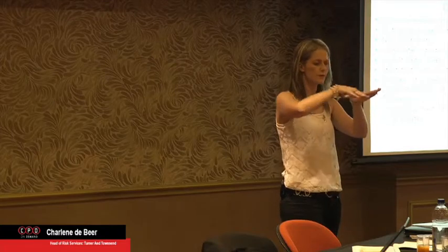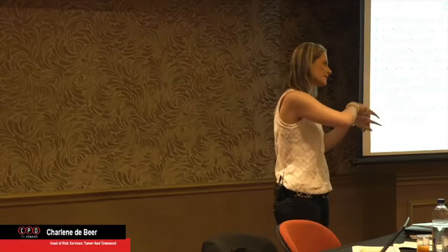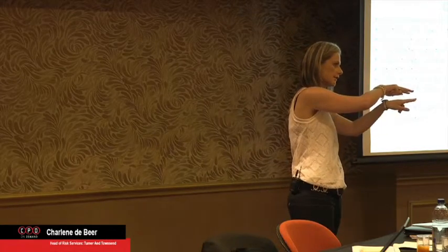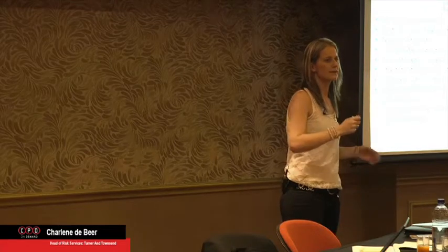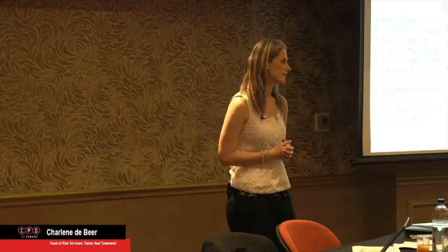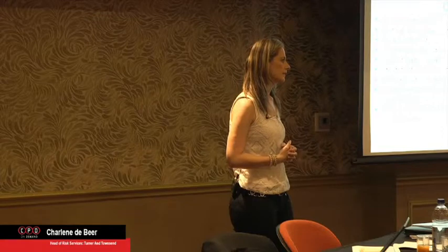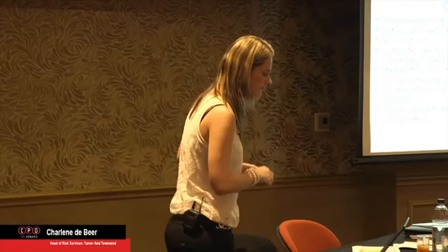It will first run the first risk's impact, and then after that it will run the second risk's impact. So it won't run the risks in parallel like a schedule. It will actually double dip on it. So rather take the second risk and look at other activities in the schedule that it might affect. Because then you'll get a better idea or a more accurate schedule impact analysis.